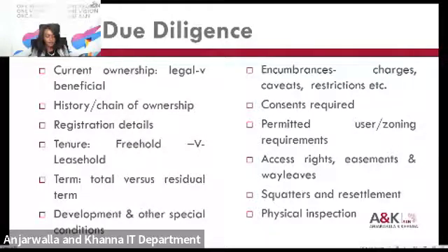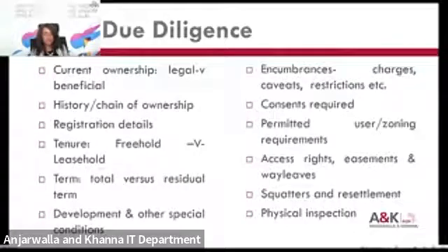So there's a second question. What impacts the choice on a lease versus a license for a project? So if the choice is between a lease and a license, we would advise the project company to take a lease because a lease is more robust. A lease entitles the project company to have exclusive possession of the land for the term of the lease. And a lease can also be registered at the lands registry.